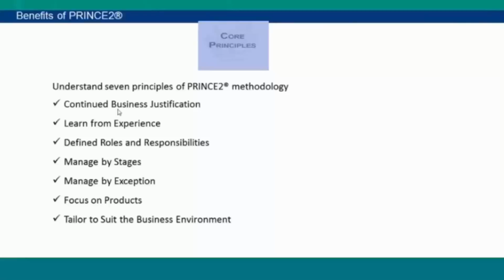Second we have, so I will show you in detail when I go to the next slide. Second we have learn from experience. So learn from experience, I told you, projects are similar. Okay, not the same but similar, right? So if you want to take anything from previous projects, you can take the good things. If I am saying that I have already created a metro line from Noida to Gurgaon, and now I am creating Noida to Greater Noida, it means I can take something from the previous project. That is called learn from experience.